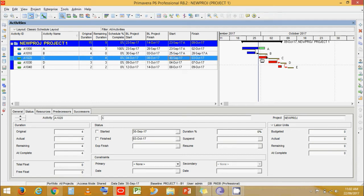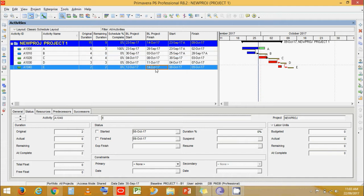This is because in Progress Override, Primavera will forget the predecessor activity relationship that an activity has if the predecessor activity is completed. The project which was supposed to finish on 14th October is now getting over on 9th October, which is positive but more optimistic and does not seem realistic.